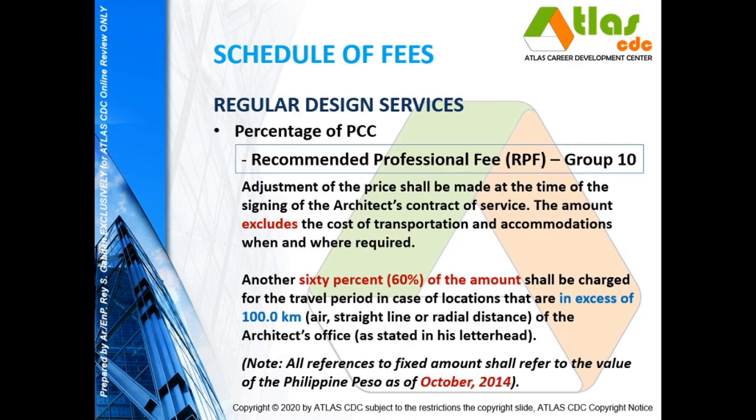So the adjustment of the price shall be made at the time of the signing of the architect's contract of service, and the amount excludes the cost of transportation and accommodations when and where required. So if the location where you are to provide your service shall be in excess of 100 kilometers, then there will be an additional 60% of the amount.